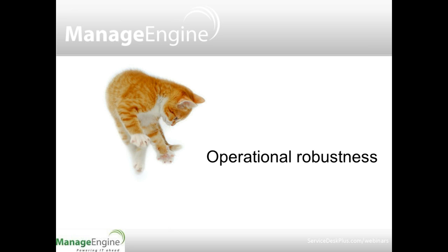A big area that I'm going to talk about more is operational procedures. It's very common that inadequate thought goes in during the design and build phase around how the system is going to be operated and what the procedures are that need to happen. The classic example here is around data. I know of systems that went live and then slowly ground to a halt over a period of months because the database needed to be reorged for performance, and that wasn't happening because nobody had designed a procedure to do database reorgs, let alone tell operations they needed to do it.